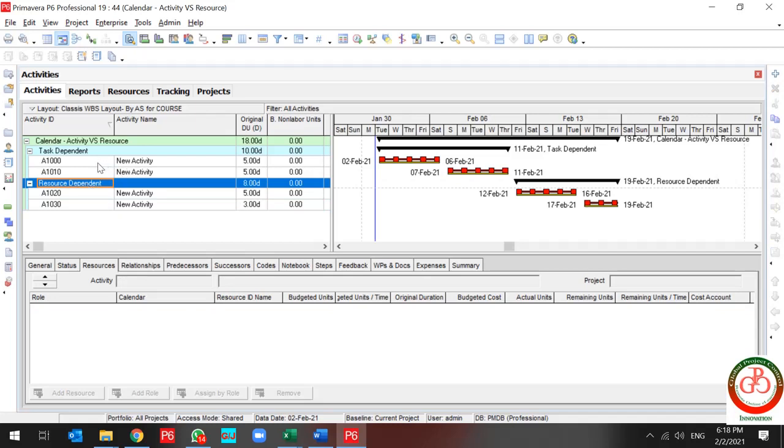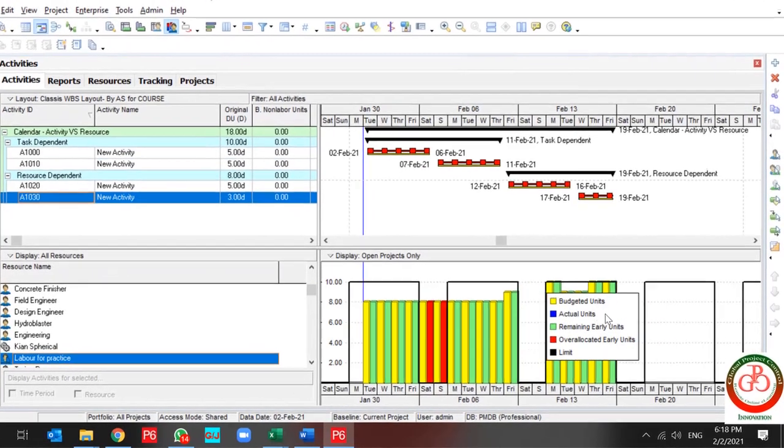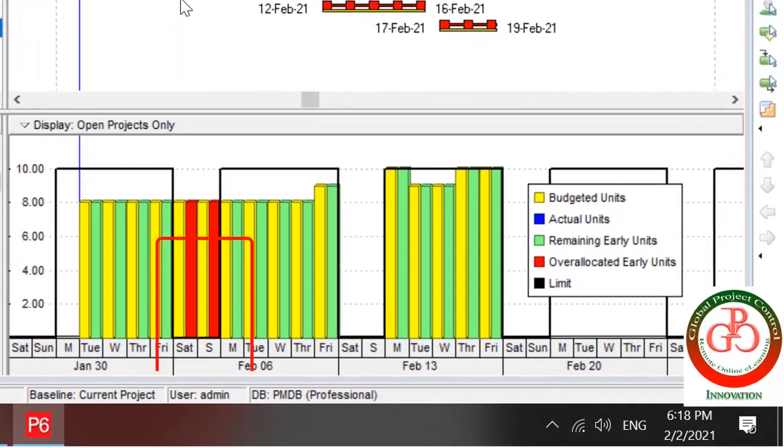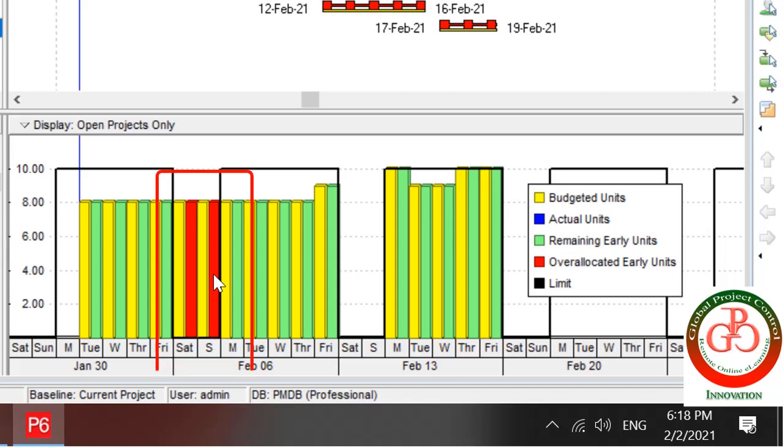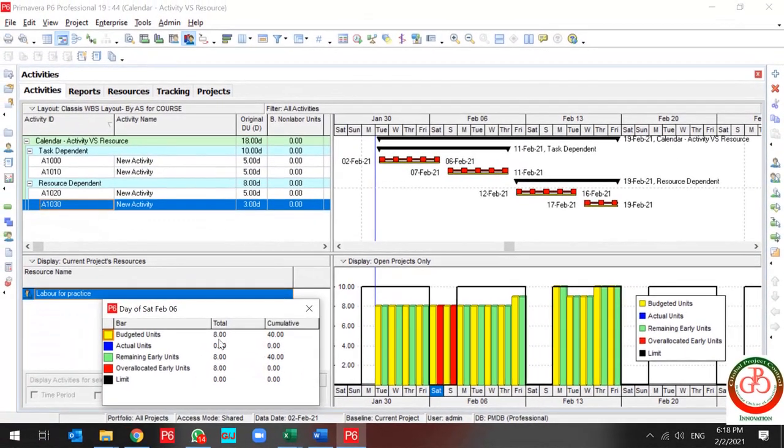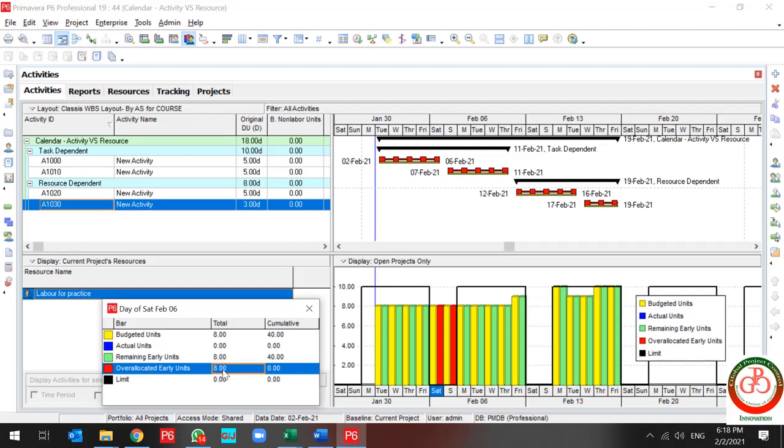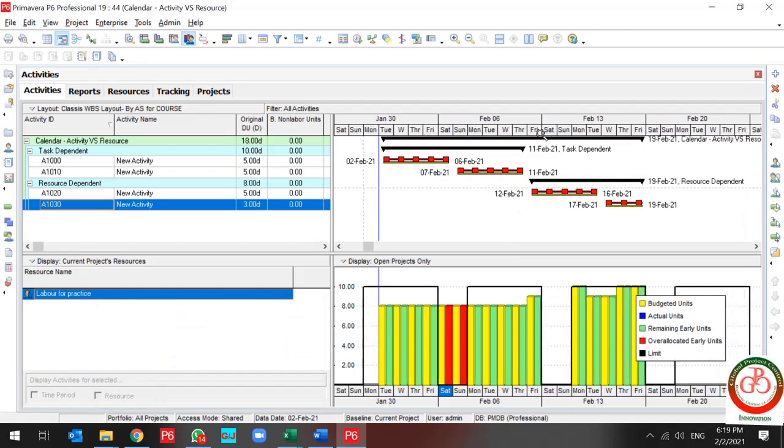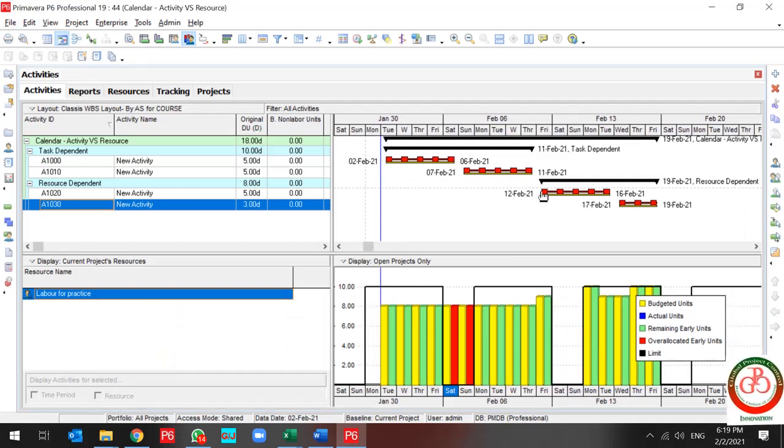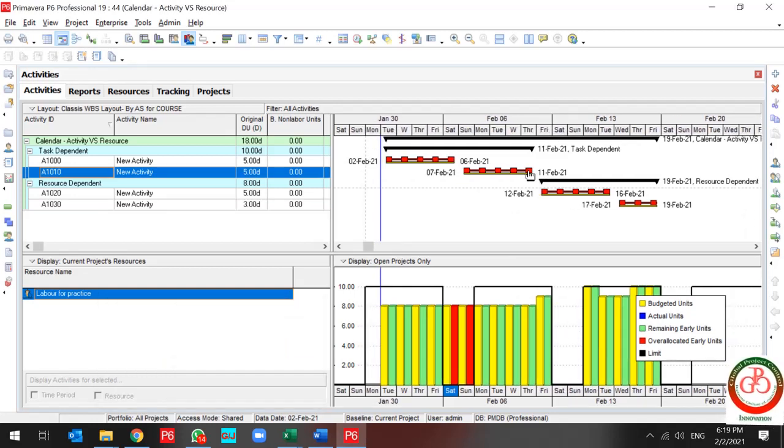But in the task dependent activity, the task drives the duration. So if I have a look at the resource usage profile, as you see during Saturday and Sunday, because of the resource calendar, we have over allocation. Let me use the filter. Okay.